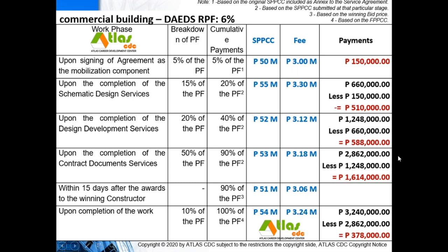That is where the concept of the lump sum or the fixed fee comes in, to make the computation easier. But if you are going to do a lump sum or fixed fee, as mentioned earlier, you have to be very sure of the scope of work and scope of services to be undertaken. Otherwise, you will lose out if the client keeps adding requirements. The construction cost grows and you are not compensated for the growth in the project's requirements.